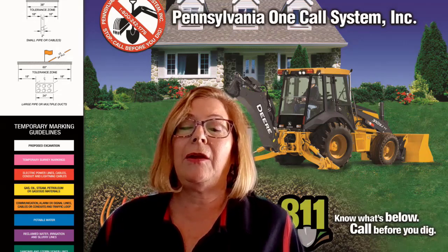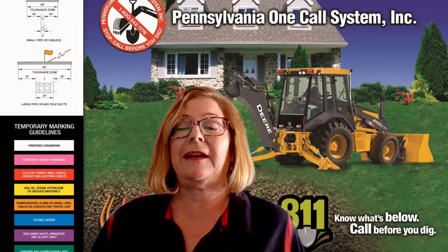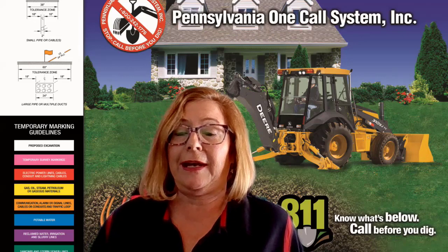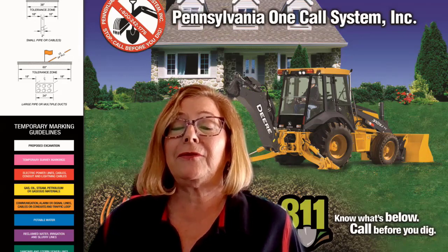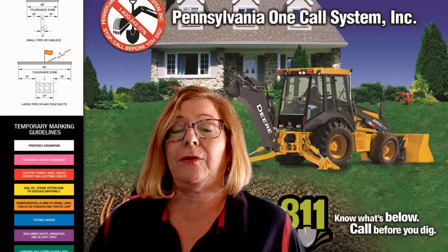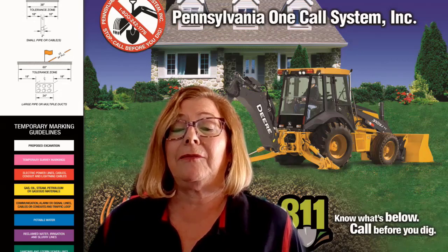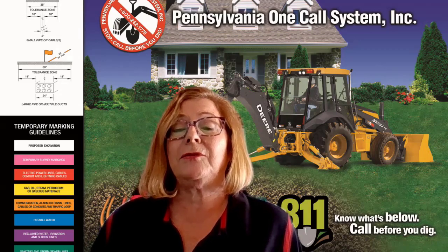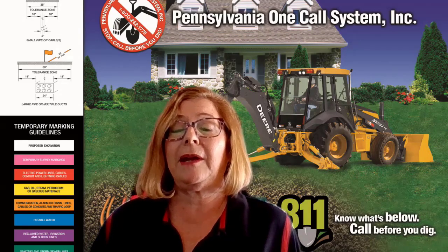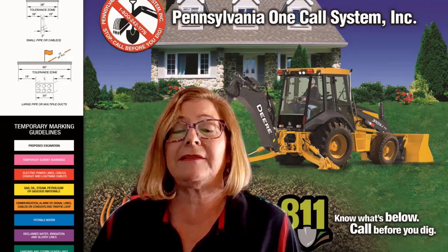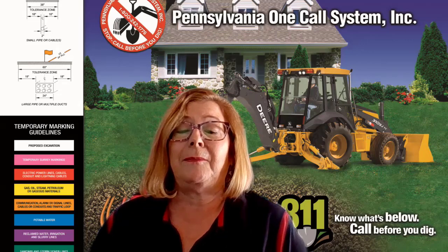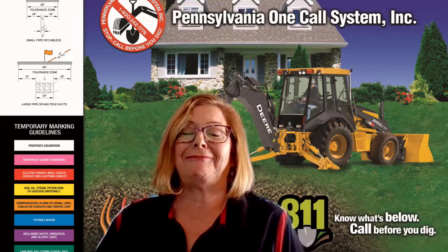You have the choice as the excavator to have the meeting or not have the meeting. If you do not have the meeting, there can be a facility owner that might disagree with you. If they do, they can respond 092 that they would like to have a meeting, and then you are required to have a meeting with them. So you do have a choice. We highly recommend at PA One Call that you have the pre-construction meetings. It's all about communicating and coordinating and collaborating. So please try to have the meeting if you can.